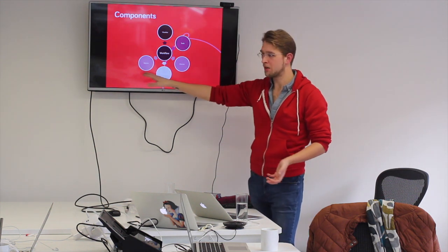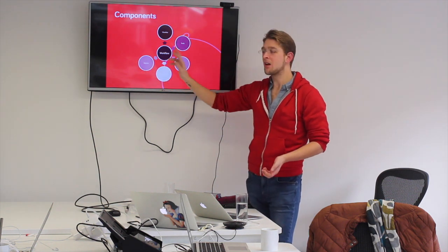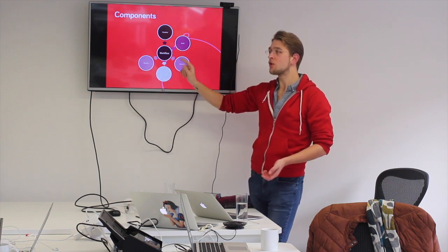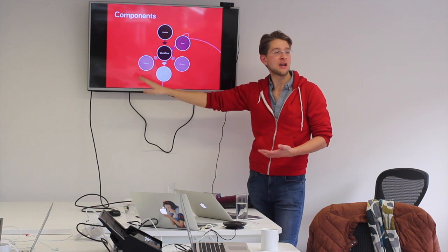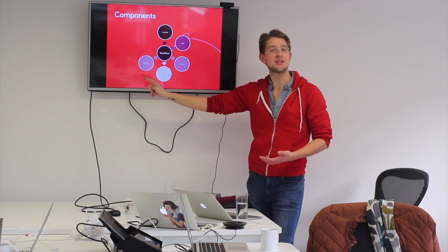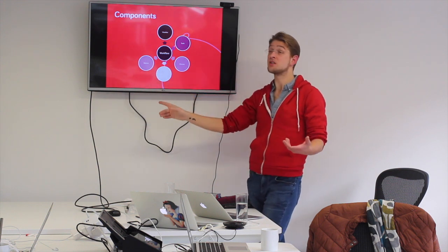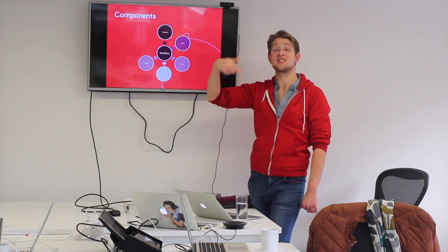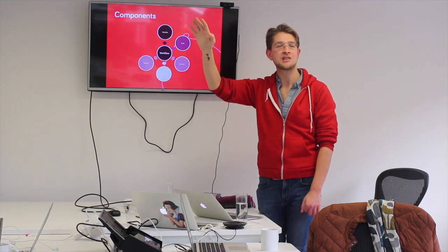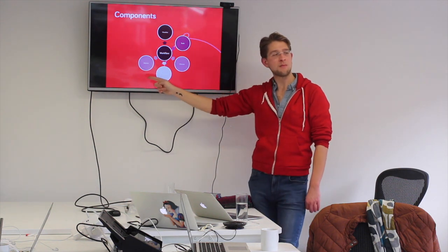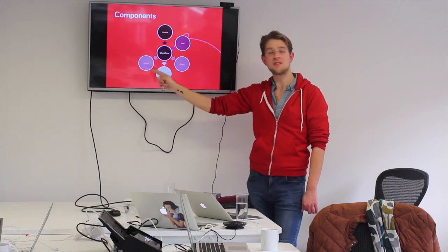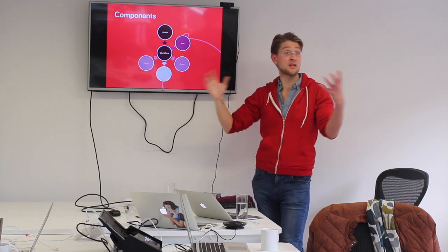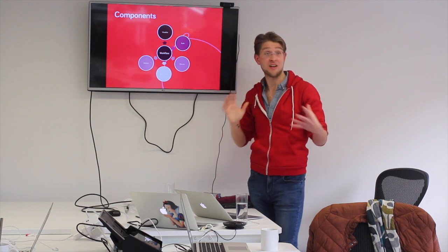So an example here is, it should be possible for us to say what is the most valuable piece of work in the tax credits delivery pipeline at any one point in time. And the most valuable piece of work will be the piece of work that is nearest to completion, which has the highest value. There are some ways that you can put simple algorithms on this that help you calculate this, that put numbers so that you can actually say, which piece of work should I do, what's the financial impact of my activities.